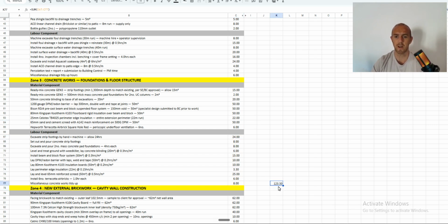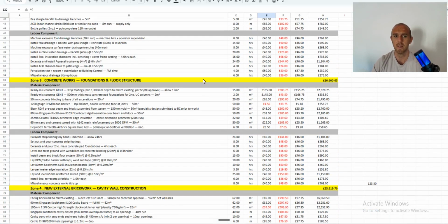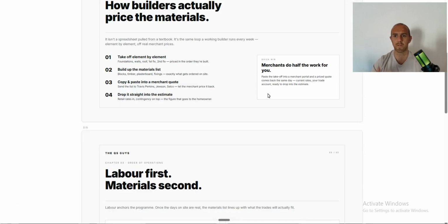So as we can see, they've got 123 labor hours, and if you've got a foreman, they can go through and then they've got all of these quantities for materials and they can actually use that as a material ordering list, okay? So that's why laying it out like this is a beautiful double whammy. You can incentivize the labor hours and there's a BOQ takeoff for your boys to use as well, okay? So that's if you've got a foreman or a project manager, whatever it is, okay?